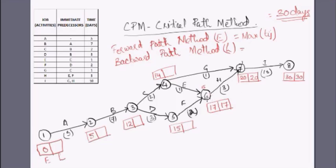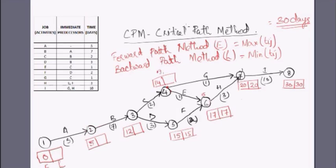Continuing backward, from node 6 to node 4 via activity F: 17 minus 2 equals 15. At node 4 there are two backward arrows. One path gives 20 minus 1 equals 19; another path gives 17 minus 1 equals 16. In the backward pass method we take the minimum of these timings. The minimum of 19 and 16 is 16, so the latest occurrence at node 4 is 16.